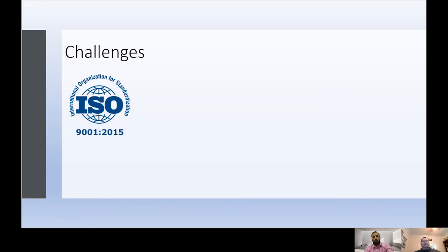You're going to face some challenges. Sometimes your organization has ISO procedures in place that sometimes preclude moving immediately to agile. More likely than not, your ISO processes call out review processes, but not what happens between those processes or how to get to those processes. You might have to work within these older structures or work to change your ISO processes to get better working processes.